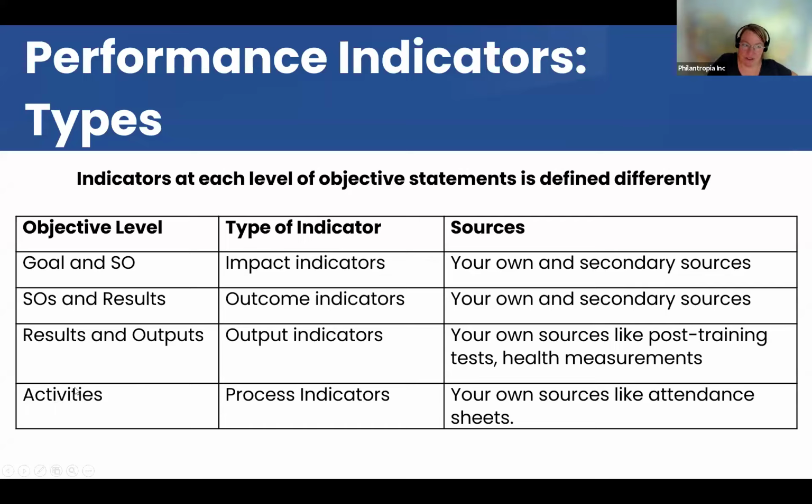So this is kind of the ladder that I talked about last time, where you have the process indicators and then output, outcome, impact, always one level higher, output being the most short-term, immediate result of your activities. Then what the people do with those outputs, they use the services, the knowledge, the goods that you distributed, and then they change something for themselves. That is the outcome level. So they change either their perception or their approach, they change their living conditions. And then that contributes to the next level, which is impact, which is long-term on the society level. Societies change, systems change, institutions change. So those are the three levels.